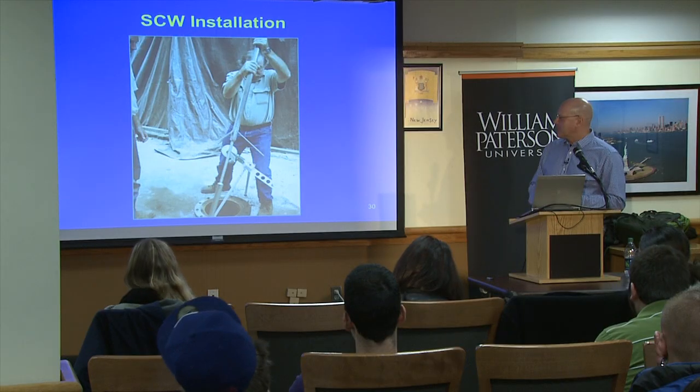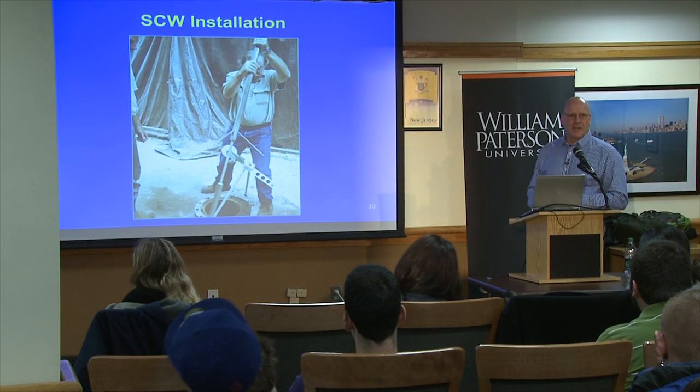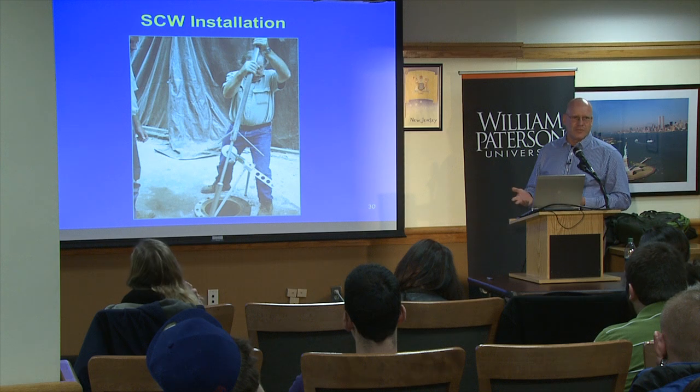And the state of New York does not want to be conditioned to a trespass. While it sounds crazy and impractical, they do not want to allow you to trespass underneath someone else's property, even though, what would that mean from a practical perspective if you found out that there was a hole beneath your property at 1,500 feet? It's not going to affect you in any way, shape, or form, but it's a legality. And so this is a geophysical contractor who's setting up and monitoring the actual drift of our borehole.